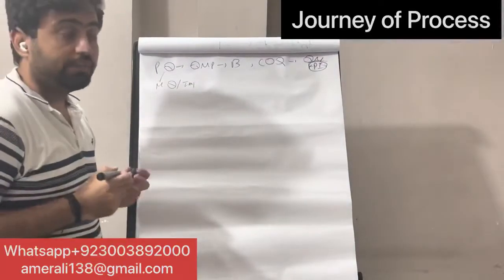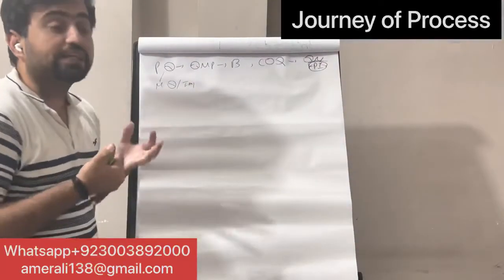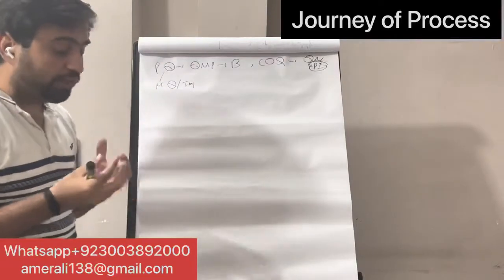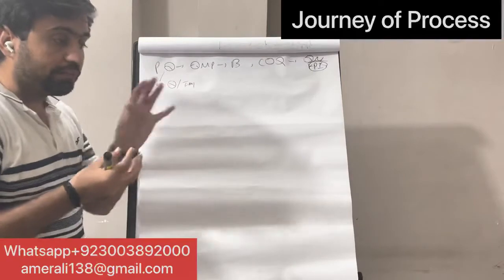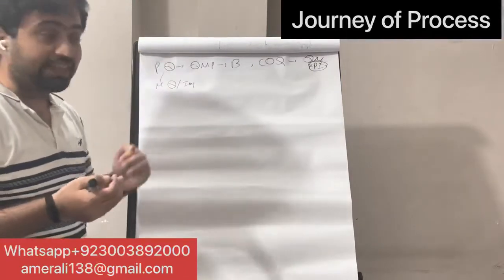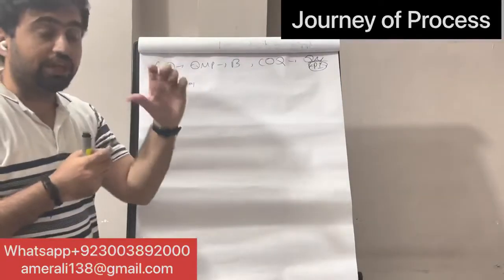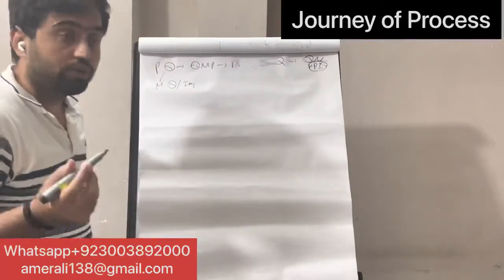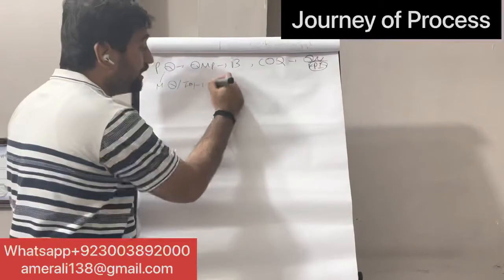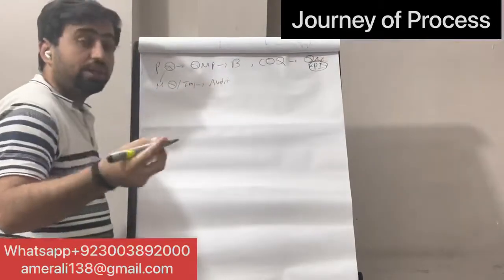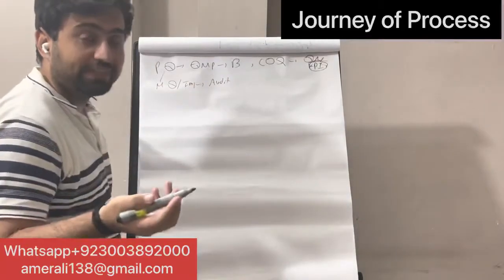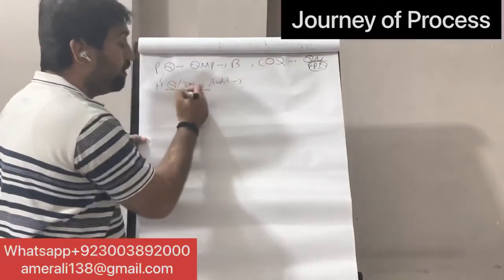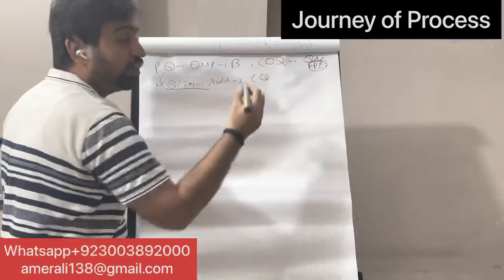Then you manage quality, or implement the quality management plan. Make sure that the quality plan is implemented. The deliverables that are being produced, they are produced according to the quality plan. While in execution, the quality team goes and checks through checklists, check sheets and control charts whether the deliverables being produced are within the quality or not. We do the audit of the process to check the effectiveness of the quality management plan. Are we following that or not? Once that is done, this is all about preventive action. We go towards control quality.